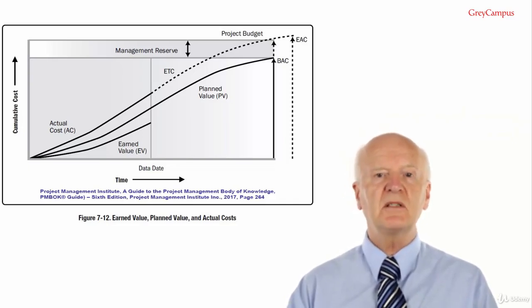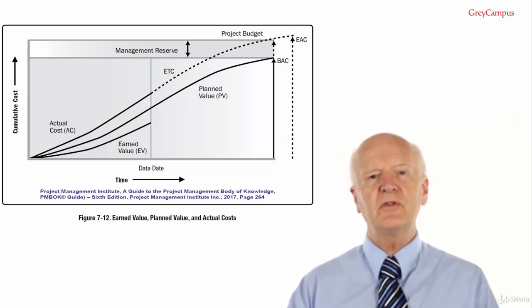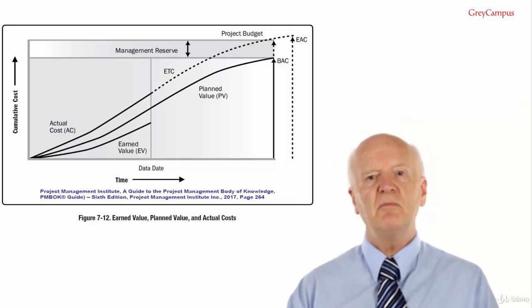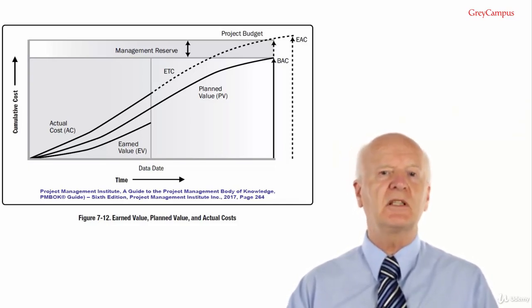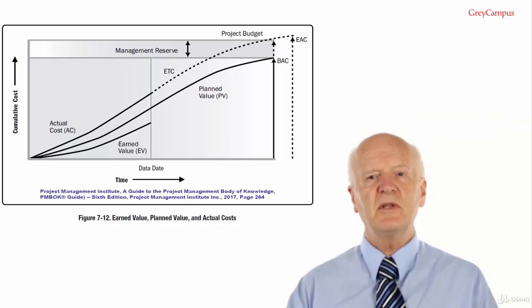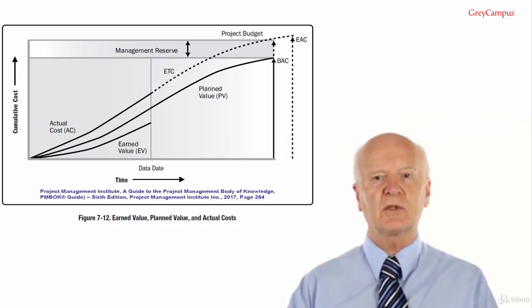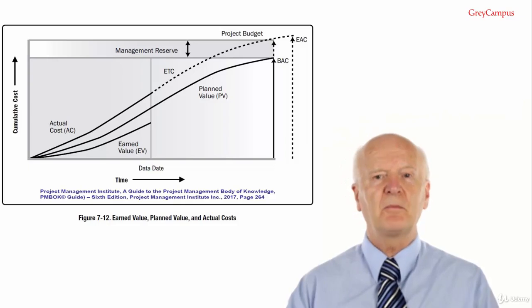Forecasting the estimated completion means a project manager and project team are predicting the future based on the past in light of current project knowledge, mainly from work performance data. So you get an increase in accuracy with this. The estimated completion is usually based on the actual costs incurred for the work completed, plus an estimate to complete the remaining work.